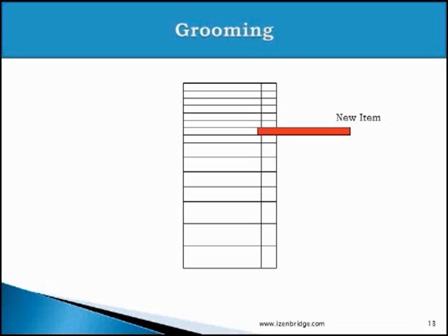inserting or identifying a new item into the product backlog. So if you get a new requirement from the business, or from your team during a retrospective meeting, where they think this is a technical improvement they should do, for example, they must migrate to a newer version of Oracle, then on the basis of the new item identified during our exploration, the product backlog needs to be adjusted. So we may insert a new product backlog item into the product backlog.